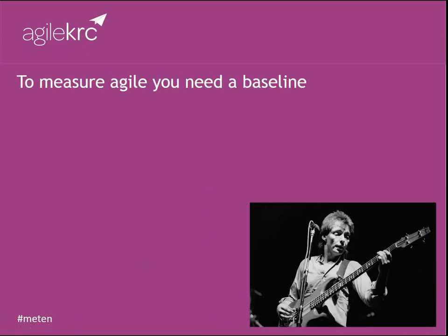So we talked about measuring, and now we come on to the next problem. I don't know whether you're on the webinar to be educated and go away from this thinking this is great, because I know I'm making this quite hard, and it's going to get even harder. Because one of the biggest problems with this idea of what do I measure, and the two different things I'm talking about, is that if you are going to do this, you've got to come up with something called a baseline. You've got to work out where you are now. I've just said how hard it is to establish measures. Well, yes, it's hard, and you've also got to come up with some now so that you can check them in 12 months or 24 months time to see whether you've made any difference.